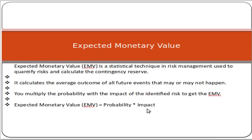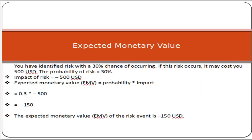Here is a worked example. You have identified a risk with a 30% chance of occurring. If that risk occurs, it may cost you $500 USD. So the probability of the risk is 30% and the impact is $500.